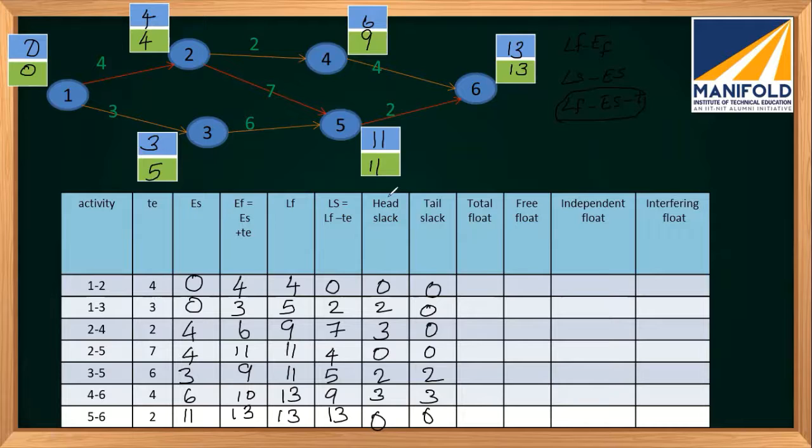Now we can check it. Anyhow, we will use this formula for calculating the float. That will be the convenient thing. LF minus EF, that will be better, right? Here you can see it very easily.